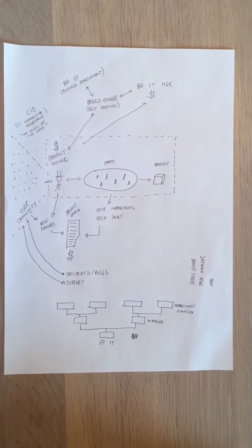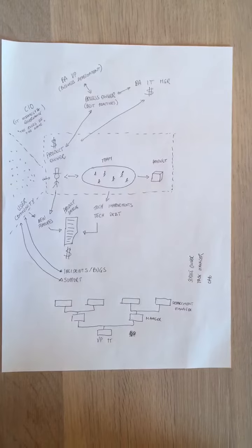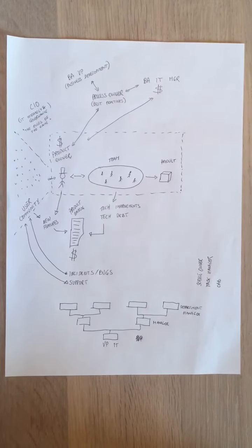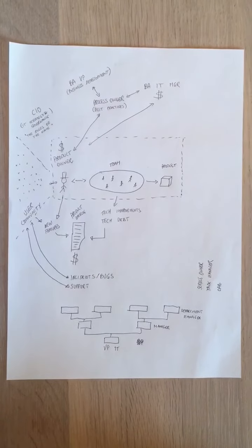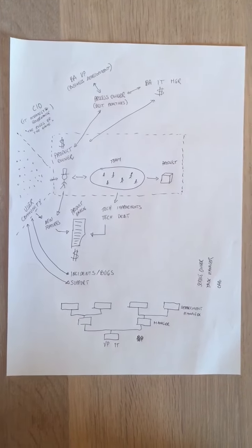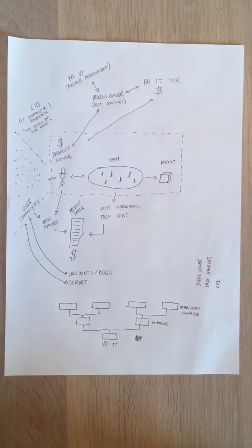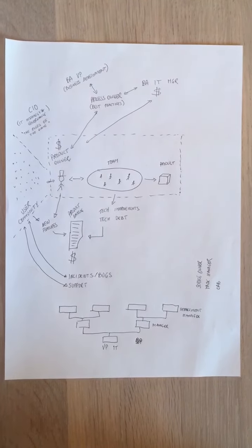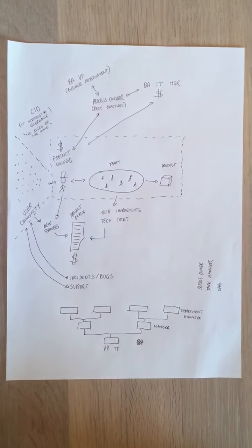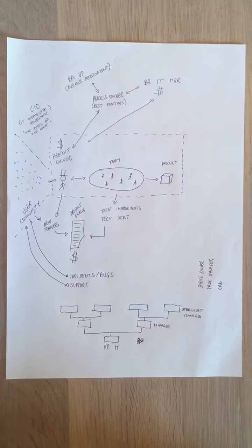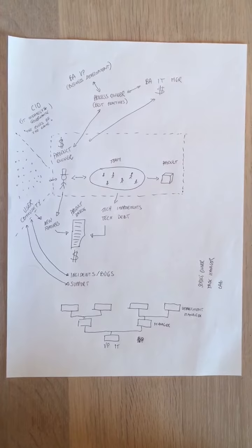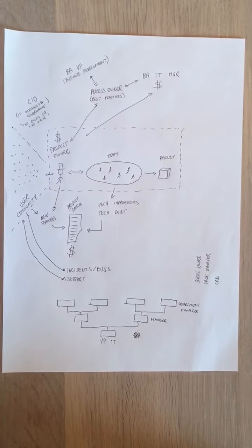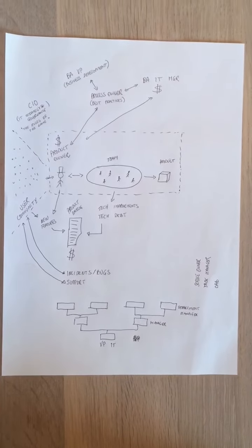If we first start with the user community. The user community could be 10 people, it could be 20,000 plus people in large enterprises. And all of those will have opinions on the features of the product, and they need to express those to the product owner. And the product owner should collect all proposals for new features or changes in the product backlog.